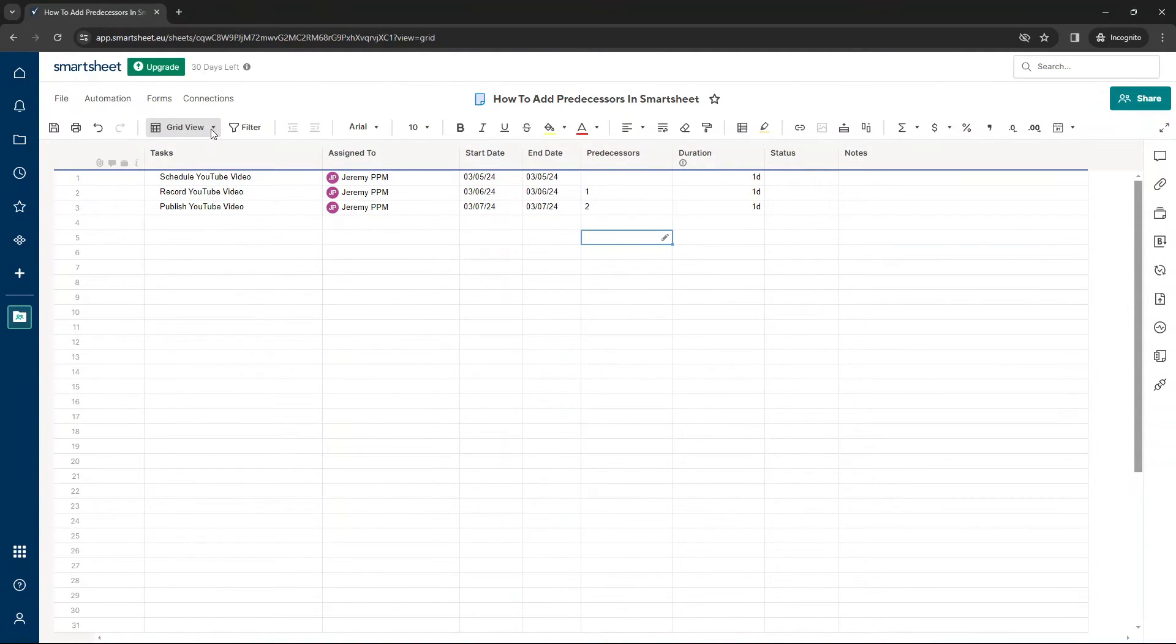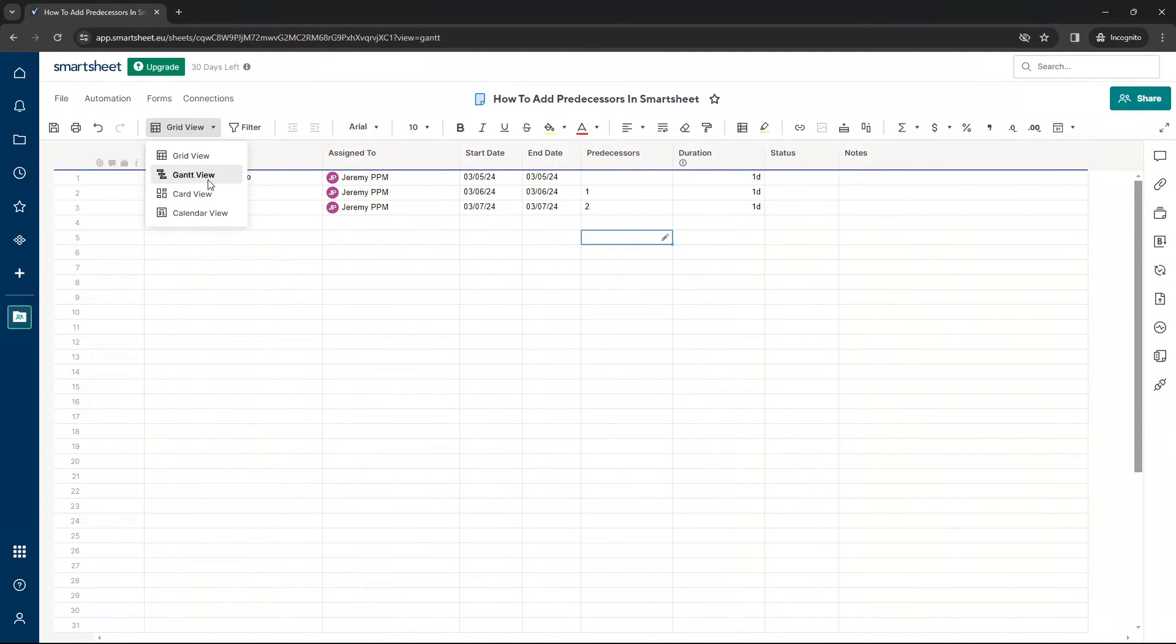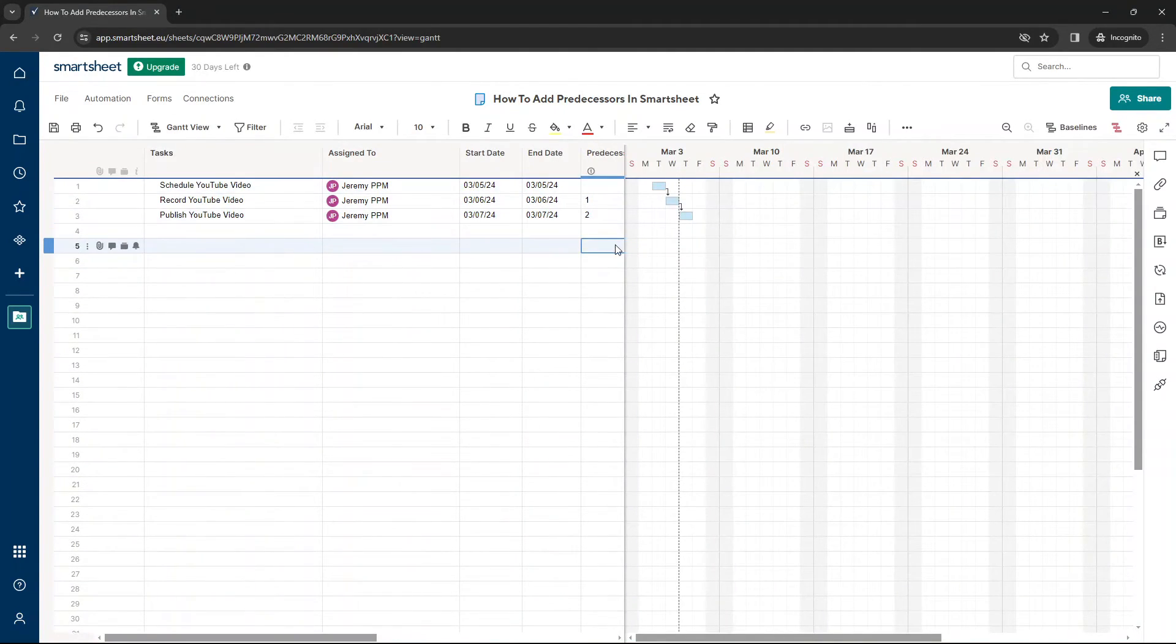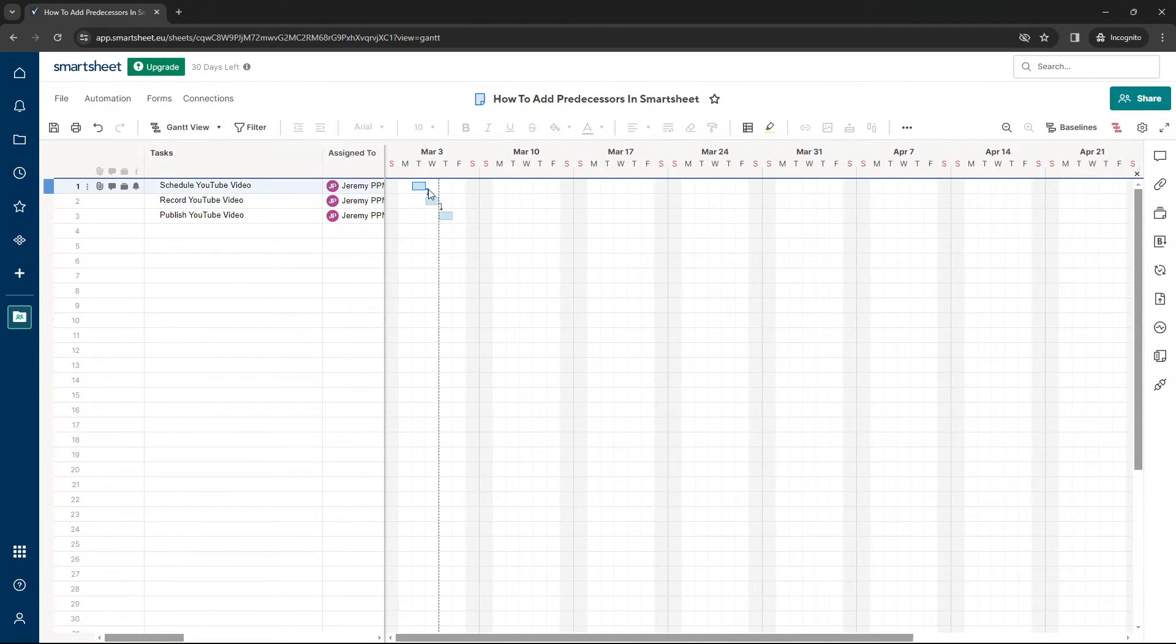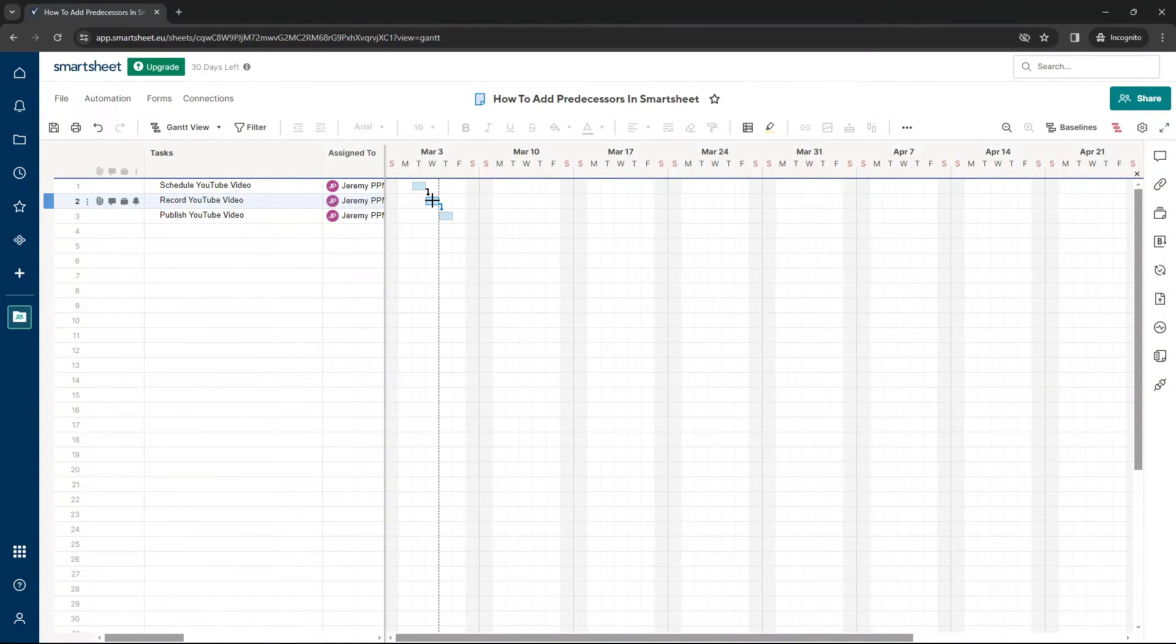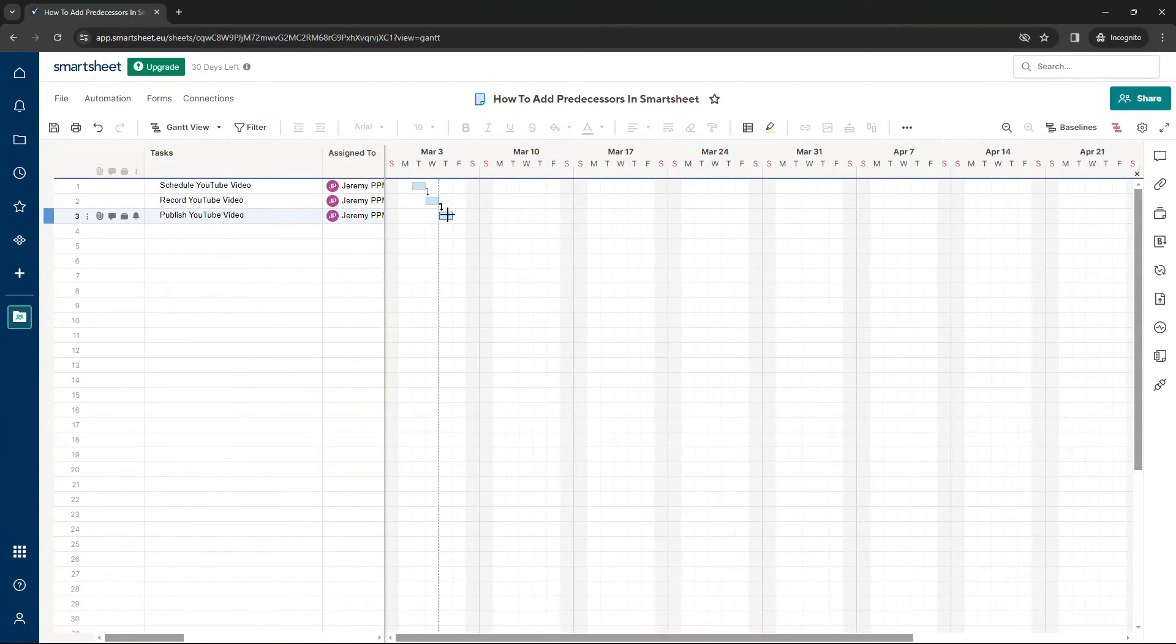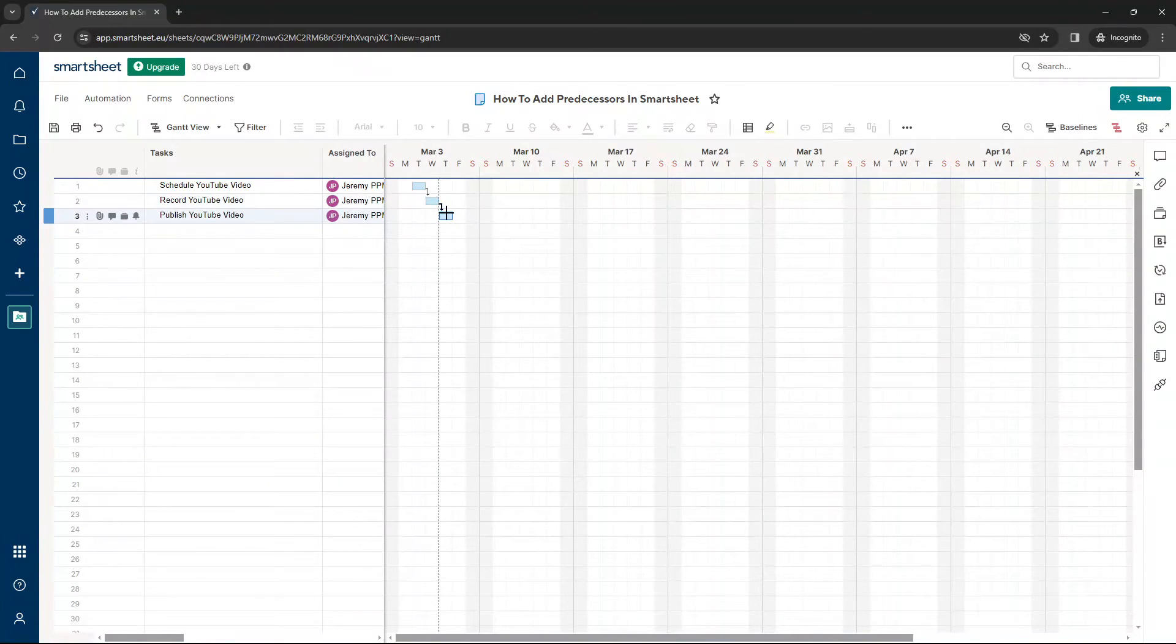So at this point, we can see them. So if I left click here and then go on to the Gantt view, you'll notice our predecessors are in place. This task cannot start until that task is finished. And the beauty of doing this, if I was then to manipulate these tasks.